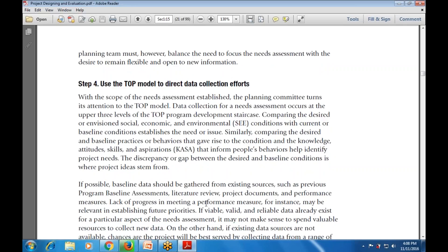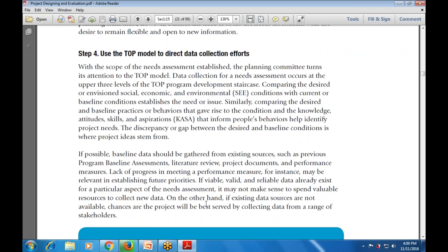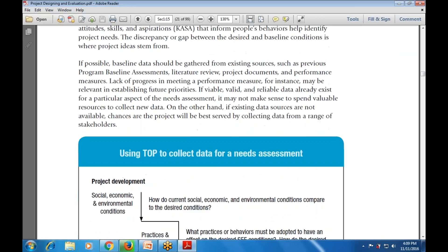If possible, baseline data should be gathered from existing sources such as previous program baseline assessments, literature reviews, project documents, and performance measures. Lack of progress in meeting a performance measure will be relevant in establishing future priorities. If valid and reliable data already exists for a particular aspect of the need assessment, or if existing data sources are available, data should be collected from a range of stakeholders.